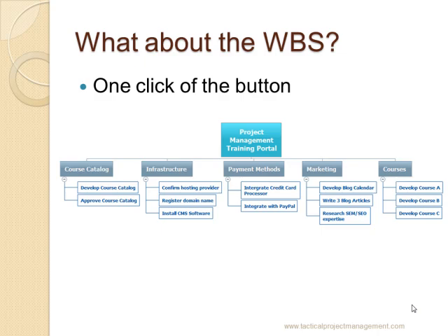And from this, you can walk away from the meeting with specific tasks, and then these different sub-deliverables can be further decomposed into other work packages and different tasks. I don't assume they're actually calling it WBS, right? No, I think in project management speak, we know this as a work breakdown structure.